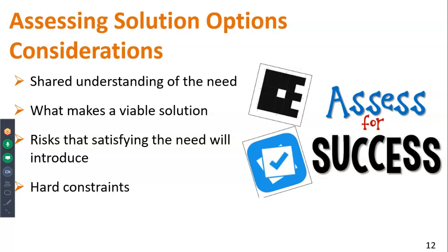Assumptions are something that we should be constantly monitoring and constantly validating, making sure that we understand if we made a decision, these are the factors that went into the decision. If any of those factors have not been verified or validated, then there's a possibility that the decision that we made based on those assumptions is going to be incorrect or could be incorrect.